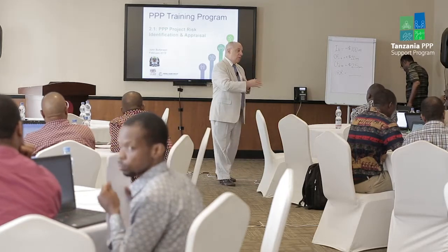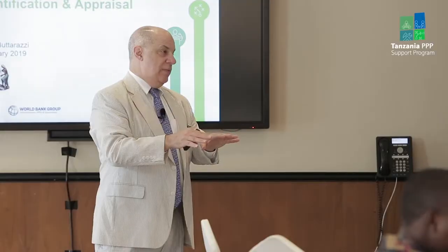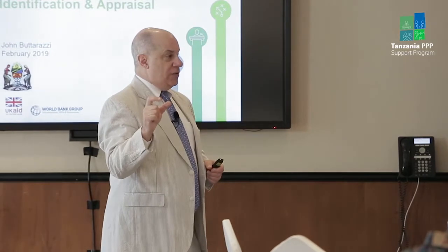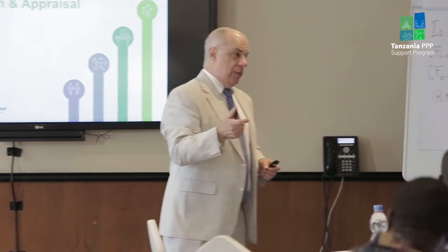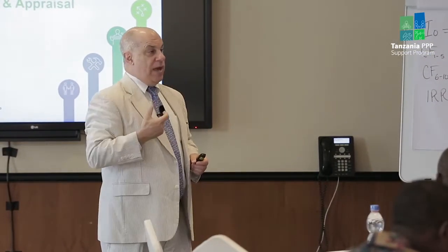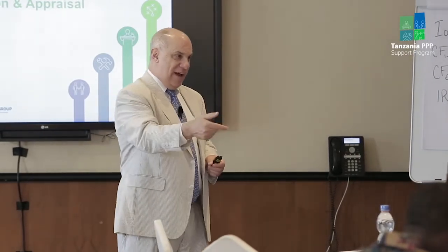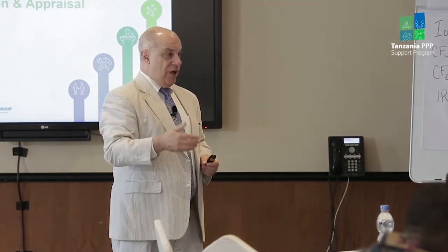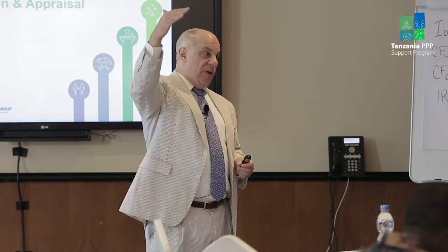Okay, so that's going to be factored into that. All right, the borrowing rate, the interest rate for, say, a loan, is the bank. It also reflects what the bank considers the risk of the project. But it's basically, for the bank, what they need to get back to make a profit on their loan, that also is risk adjusted. So if they consider the project to be riskier, the interest rate will be higher.